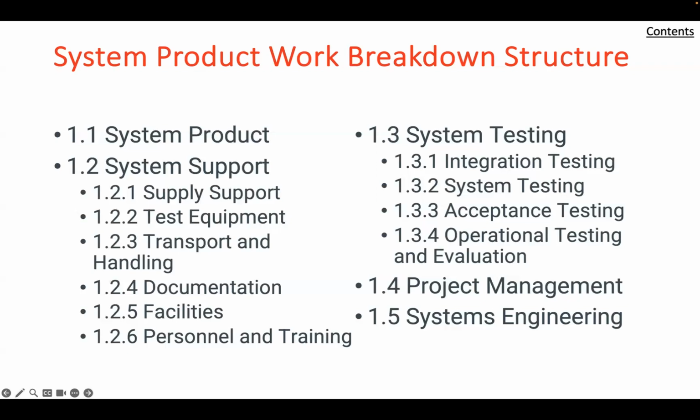Critical path analysis is an essential project management tool that traces each major element of the system back through the engineering of its constituent parts. Estimates are made of not only the size, but also the duration of effort required for each step. The particular path that is estimated to require the longest time to complete its constituent activities is called the critical path. The differences between that time and the time required for other paths are called slack for those paths. The resulting critical path network is a direct application of the WBS.